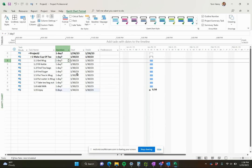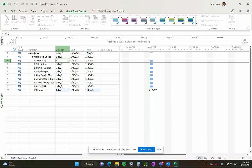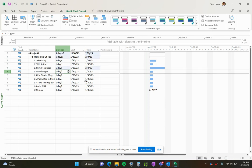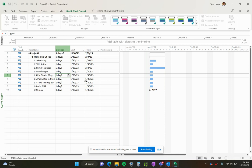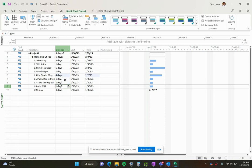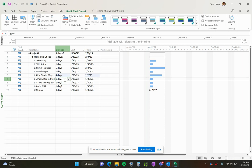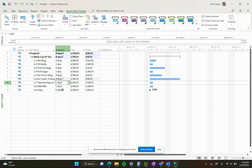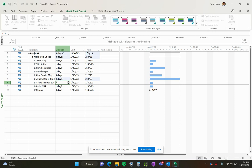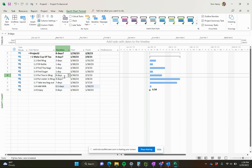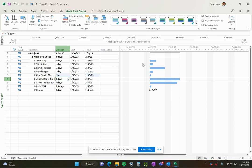What I want to do is update the duration of these tasks. Get the mug - that probably takes me two days. Fill the kettle one day. Find tea bags five days. Find some sugar a bit quicker, one day. You get the idea. You can notice that the question mark at the end of these - it's telling me I've never updated that. I never said one day, it's just a default which is one day. But put water in the mug, you never know how long that's going to take you. So you could put eight question mark, which means you've estimated it, but still updating on the Gantt chart. Seven days for take the teabag out and add the milk 0.5 days. You can do hours, you could do minutes. Let's make this one hour. It's going to decrease the duration significantly on the Gantt chart.